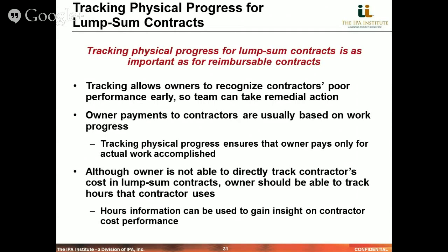Certainly, the owner is not able to track contractors' cost in lump sum contracts, but they should be able to view, particularly in engineering, some details around the hours that the contractor uses. And this would help gain some insight into the overall cost performance of the contractor.